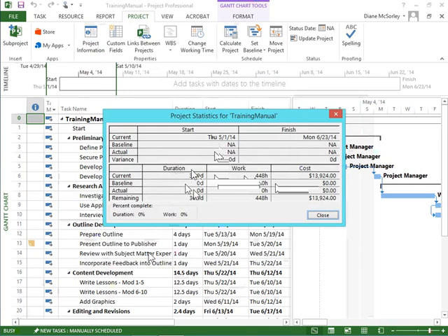The plan is perfect. All we're doing now is really waiting for the first task to get underway. That's the time to set the baseline because it'll take those currents, move them into the baseline row, and now we have an actual permanent record of where we started. Over the life of your plan, the currents may change. As tasks finish late or finish early, it's going to shift the current. The baseline will always stay put.